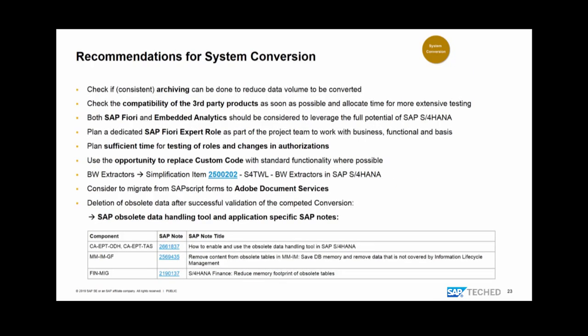Some more things for system conversion: archiving is always a good idea — the less data you have to move, the shorter the runtime and downtime, and the less data you have to clean. If you can archive old periods and old years you no longer need, you eliminate the need to cleanse that data. Regarding third-party products and SAP add-ons: SAP add-ons listed on our price list always have a successor in S/4HANA, usually available within the first three months after initial release shipment.